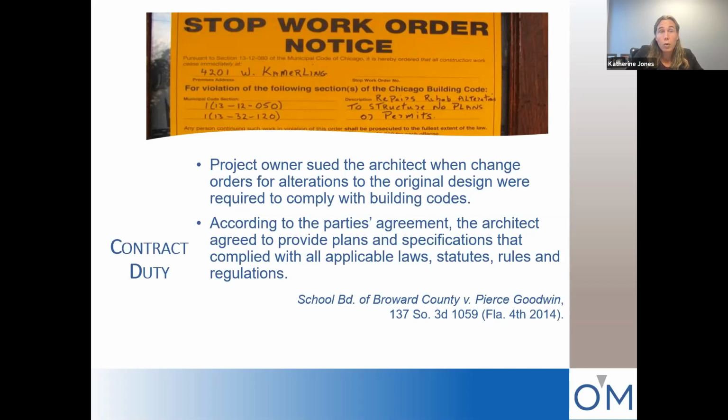And the court on these facts said, look, you didn't agree in your contract to the ordinary standard of care that we would have seen in this E500 form. What you agreed to was to provide plans and specifications that complied with all applicable laws, statutes, rules, and regulations. Furthermore, you agreed that the building director for the school board of Broward County had the final say. Therefore, you might have acted in a way such that an architect would act in this locality, but that's not good enough because you agreed to a higher standard of care.